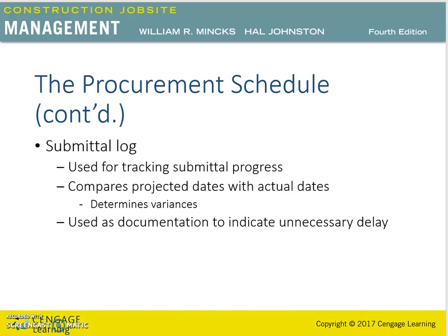The submittal log is used for tracking the actual progress of the submittal. Many contractors use this only for the dates the submittal was received by the appropriate parties. A more complete and useful submittal log would compare the projected dates with the actual dates.